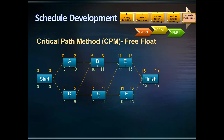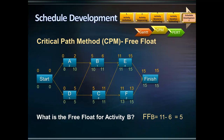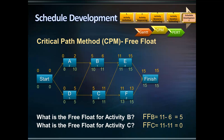What is the free float of activity B? The free float of activity B is the early start of activity E — which is 11 days — minus the early finish of activity B — which is 6 days — so free float of activity B is 5 days. The free float of activity C is zero, because activity C's successors, activities E and F, have an early start of 11 days, leaving no room for activity C to float without impacting them.